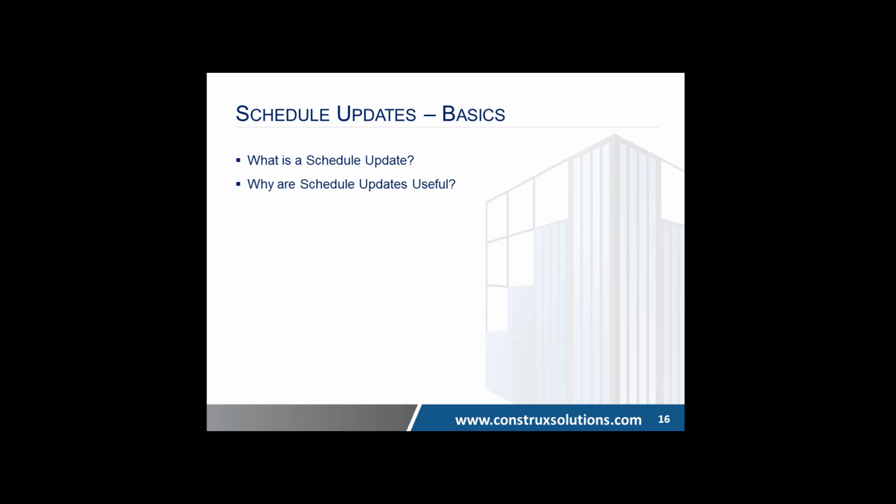When I do a forensic analysis, I have to study every schedule in great detail, but from a management perspective, it's about giving the user the ability to see a certain subset of activities without a ton of noise. One of the challenges for any of these programs is once you get hundreds, if not thousands, of activities in them, the people who are actually doing the work generally don't have Microsoft Project or Primavera, and if they're going to view any schedule, it's going to be a big, thick paper copy. So filters come in handy there if you want to filter down to the next 3 weeks of work, or to a certain trade. It makes it a lot more manageable for them to view these.